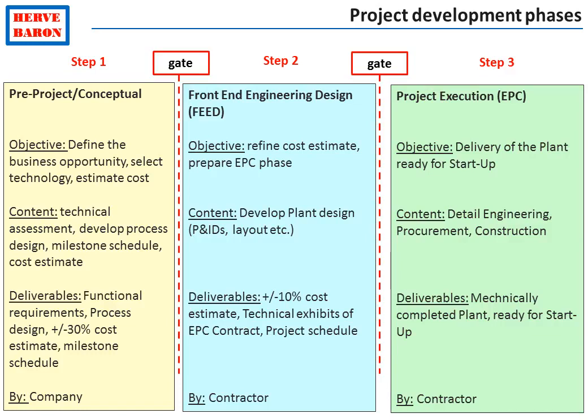And this will normally be contracted by the client, the oil and gas company, to a contractor under a fixed price project contract called a lump sum turnkey contract. In other words, at this stage of step 3, the company has entered into a contract with a contractor for which it will get a turnkey plant for a fixed price and for a determined delay.